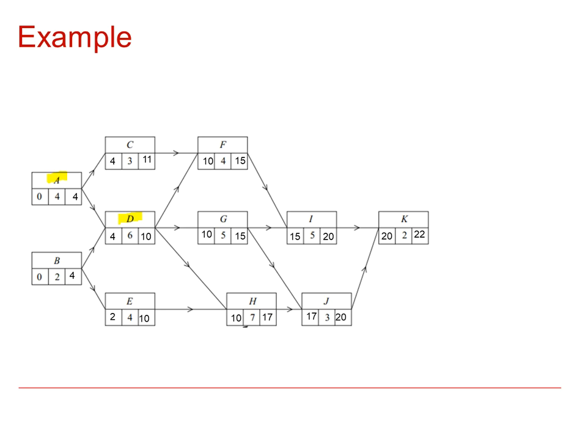Then coming down, we see that G is, H is, J, I, and K. So this time our critical path is quite complex. There's maybe more than one path going from start to finish. You can see here it goes A, D, G, I, K, and also branches down to H, J, and K, and from G to J. So you need to list all of that.